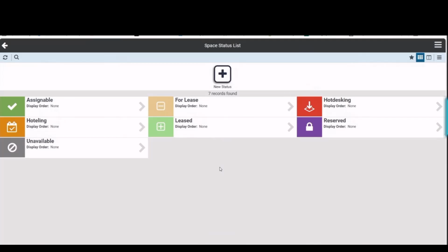And I'll tell you, the one thing that stood out when you were talking about that, and we've had this happen at UC, and we tried to be good about things and got a lot better than we used to be, but if somebody is feeding into the space management data room numbers that were used in the construction documents from the architect, that can be super problematic if there's not oversight by the university, because, like you said, they may come up with their own set of room numbers for their own ease of use.